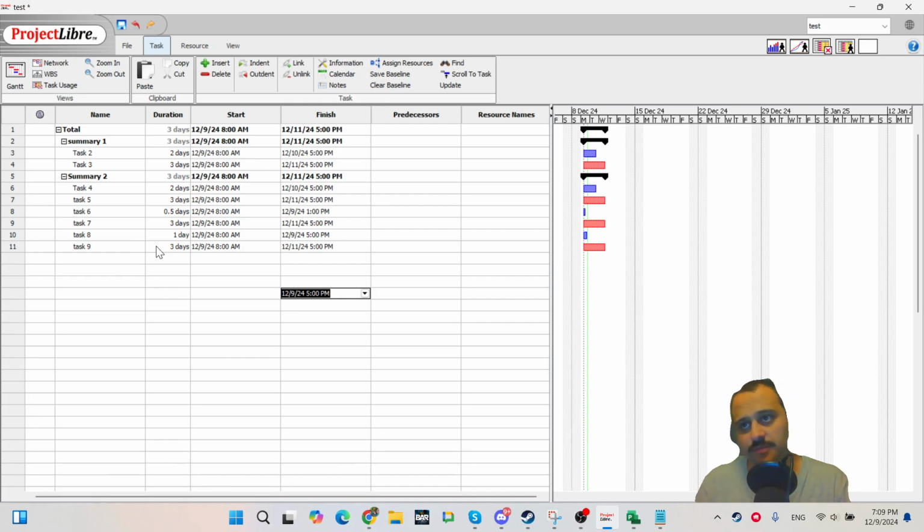The concept in Microsoft Project was to have a task without a stop. For example, if you want to put cement in the foundation of a building, you cannot say, okay, working hours are done, we need to stop, we will continue tomorrow. It's an ongoing process till you finish the work. It doesn't matter if it takes 2 hours, 5 hours, 10 hours, 24 hours. If it requires 24 hours, it should continue for 24 hours. Otherwise, you're going to mess up. But here it seems the concept they implemented is not aligned.